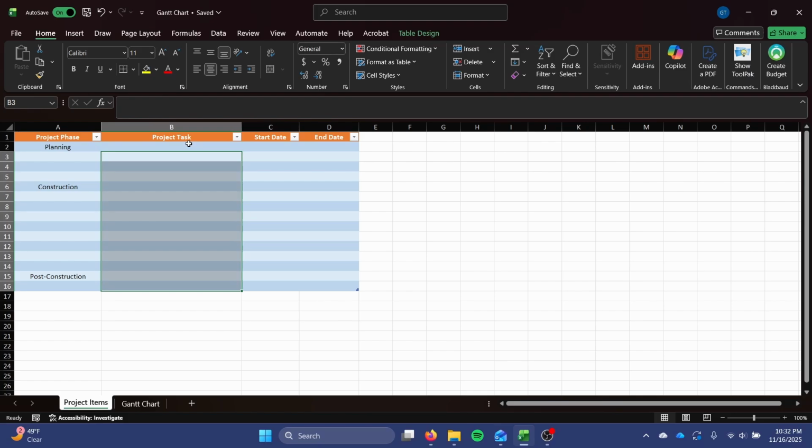The other thing that I want you guys to keep in mind is selecting reasonable dates. So imagine you're doing this actual project, you're engineering, you're doing the design right now. When would you start the construction of this project for O-Hill? Well, O-Hill is used by students all the time. So you might want to wait until a summer break, for example, to start any construction. But if you're starting construction on summer break, that means all the pre-construction has to be done before then. So the pre-construction needs to happen now and into the spring.